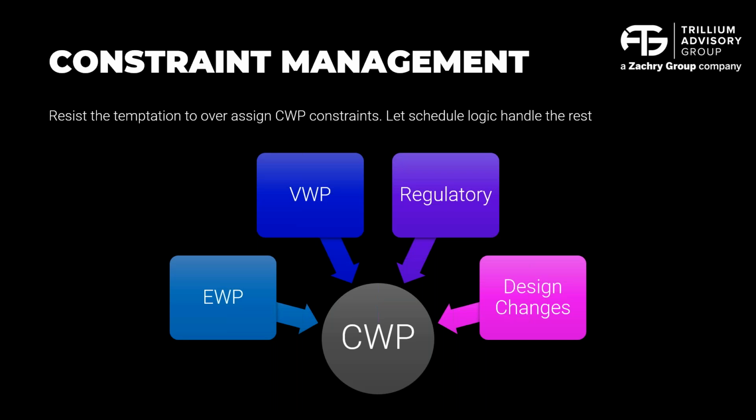Yeah, I can't say any better than you had said, so I'll tack it on another area. Of course, we've been focusing on a mega project right now, but within Zachary, we will be applying AWP to all ranges of projects, small cap, mid cap, and such. And if you're not careful there with your package generation, I'm seeing the tendency at times that we're going to create a CWP for every bit and part of work, because the original CII methodology had limits on CWP size. What we're doing now is really spending that necessary time during the schedule generation phase, and really talking about what makes sense for this particular CWP. Take off those boundaries that say it can only be X amount of hours or X amount of duration, but really what makes sense for how that construction team wants to construct it, so that they understand what's going to be in it. And then it makes it much more clear for engineering.